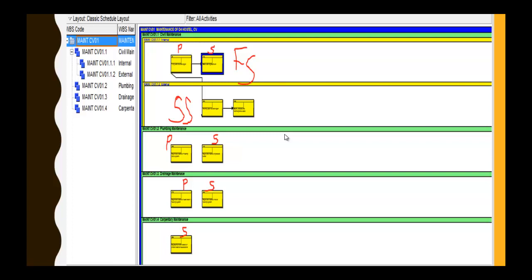Finish to Finish means the predecessor and successor activities can finish at the same time, and it is used for delaying activities. SS, Start to Start, means the predecessor and successor activities can start at the same time, which is also used to fast-track the schedule. Lastly, SF means the predecessor activity can start before the successor activity can finish.